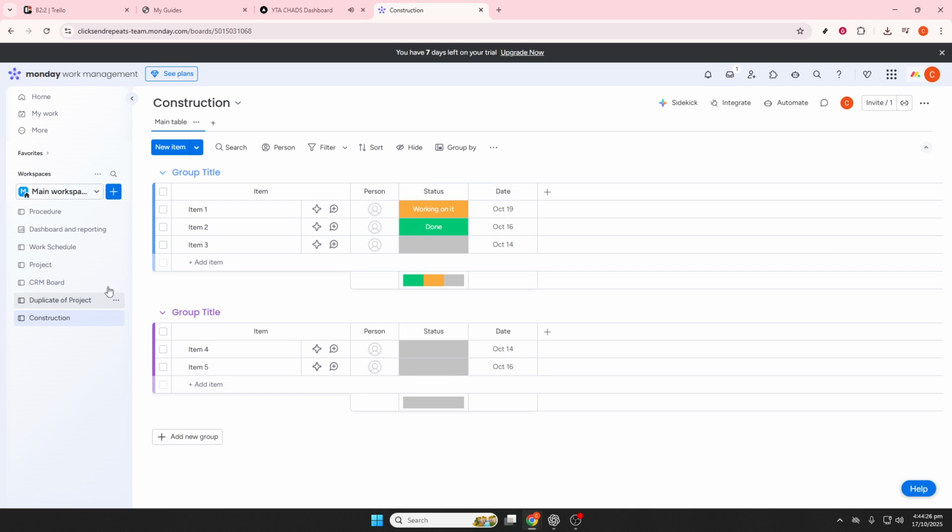Managing your budget and resources is a critical aspect of any project. In Monday.com, use formula columns to calculate costs versus the budget and track remaining funds. Integrate other accounting tools or manually import cost data to keep everything up to date. Utilize dashboards to get a clear visual of budget consumption and potential overruns, keeping your financials transparent and manageable.